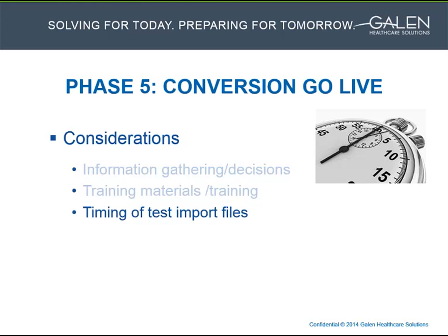So, timing of test import files. When converting data into the test environment, the Galen tech can time how long the imports take, especially with the large files such as results and scan documents. We typically find that those take quite a bit of time or have the potential to. I will make a quick mention that Galen does have some conversion tools, some already implemented and some in development, that can help expedite this process, but nonetheless, these can take quite a while. So the timing in test is important.